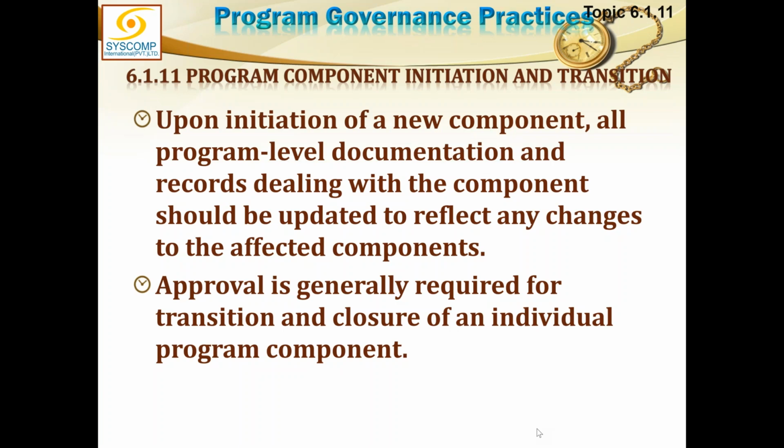Just say you are a project within a program. You are a project manager. I am your program manager. As far as initiation and closure is concerned, naturally you are answerable to your sponsor, and the program manager is the sponsor. So the program manager, for all practical purposes, is giving you the initiation. He is allowing you to initiate or to close. And on top of the program manager, the program steering committee is looking at it. The program manager seeks permission from the program steering committee for starting any component or closing any component.